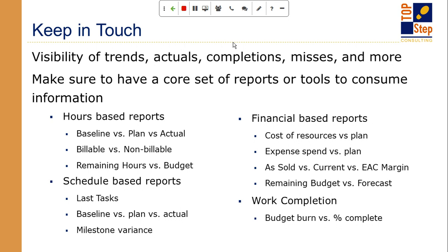Okay. The next set of hours that are key are billable versus non-billable. This is where you're delivering the project, but you're also having to understand how much of an investment you're making as you're delivering the project. This might have never been the plan. You never planned to spend non-billable hours, but you certainly run into a situation where you find yourself giving away some hours, maybe having to track some shadowing hours based on somebody you're bringing on who's new. Those are all good metrics to understand what the total cost and the investment has been on this project.